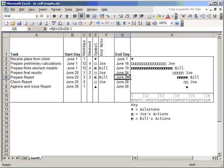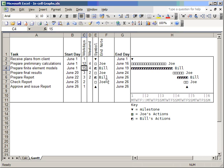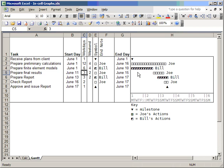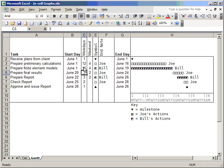That's the end date. But how do we display that in this nice looking Gantt chart, which is very easy to change? Well, I can maybe show you how easy it is to change. Let's reduce the duration of this to six days. We can see what's happened there is the whole Gantt chart's updated. Obviously these activities here are linked to the completion of that activity there, so it's had an impact on other parts of the Gantt chart too. I'll just return that back to 15.